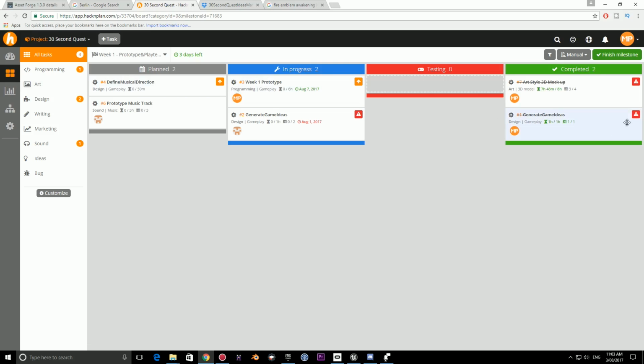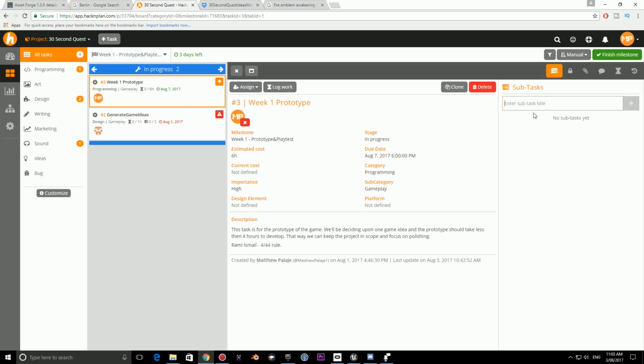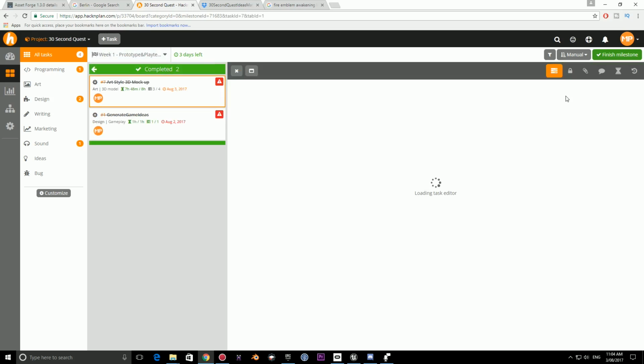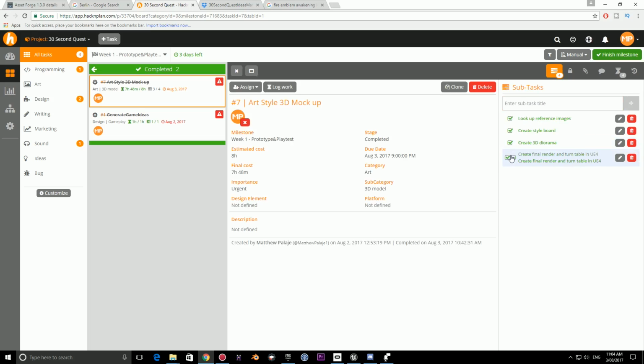Our first few tasks are completed here. Aaron's completed this, he just hasn't moved it over to completed. Something else I really like about this is that you can assign a specific due date to a milestone and the specific amount of hours, and the subtasks are really easy to add in. This one doesn't have any. If we go to my art style mockup, there are my subtasks, when it's meant to be completed by, and just some notes and stuff like that.